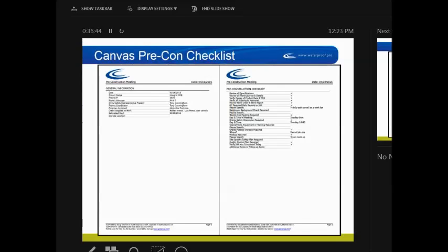Review the work order and work report. That was one thing that came up in our operations meeting on Friday. Foreman, if you notice something on a line item that you can't make money on, or historically you can't make money on that item, now's the time to bring it up. We do have operations meetings every week, which is great, and that's a good time to bring it up too. But some of these things we can catch at a pre-construction meeting, and who knows, that might save us money and give us more production on the job site.